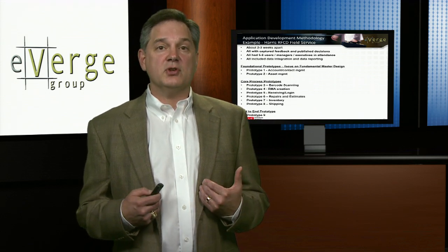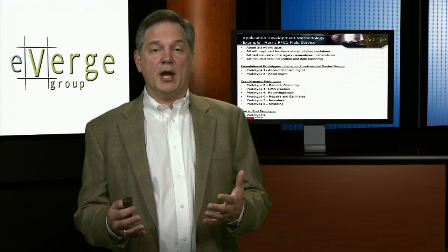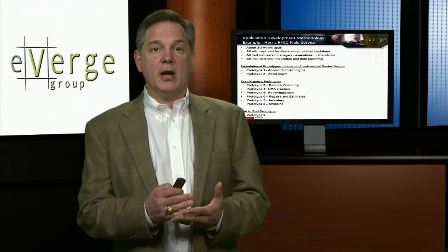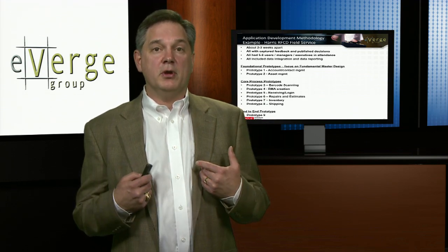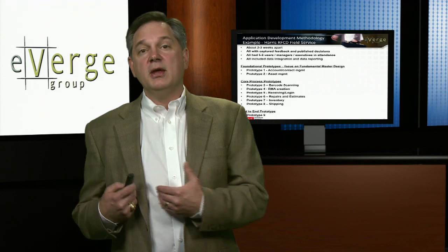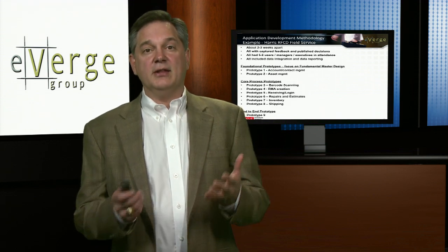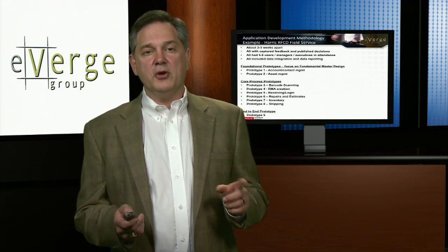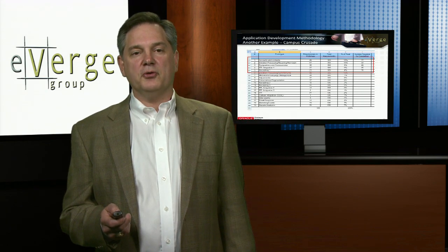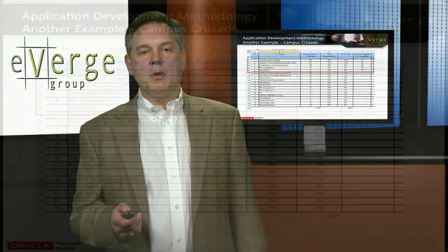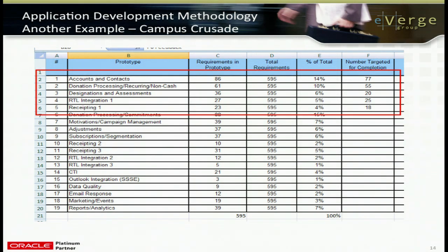And as eVerge consultants, we're going to give them design options. We're going to say, here are your 3 options, here are your costs and benefits, advantages and disadvantages of each. If we were in your shoes, this is what we would do. Here's what our other clients have done, and let them make the decision. Those are some of the key concepts with Precision Fit. Another example of one of our CRM clients, you can see we broke it down into about 19 different work streams, 19 different prototypes that were work streamed.